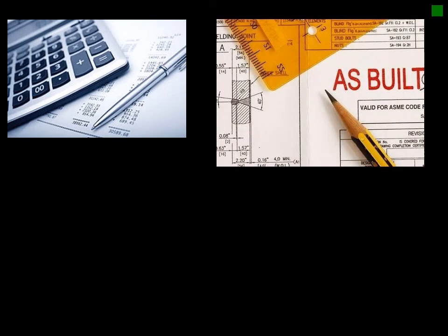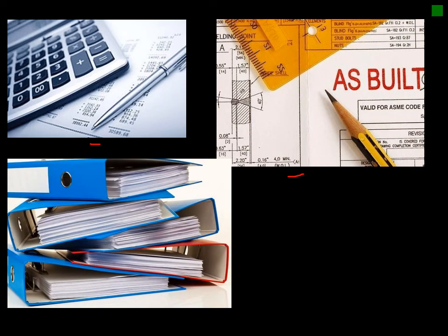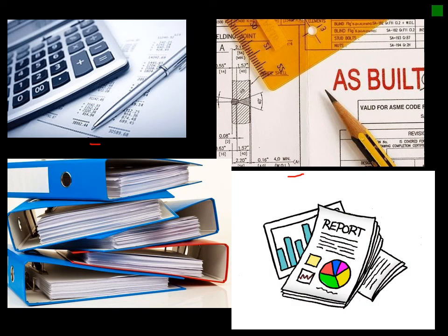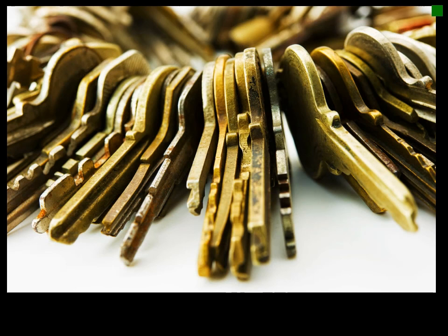Okay, so what we try and do is a constant calculation of buildings, keeping the as-built up to date as we go along. A whole lot of paperwork, administration, and keeping track of everything that goes on is very important. And then reporting, unfortunately, we have to keep up to date. And then at the end, we give over the keys to the client. All the keys are marked for which door, and that's also quite a long process, but in the end, that's how the keys are handed over to the client.